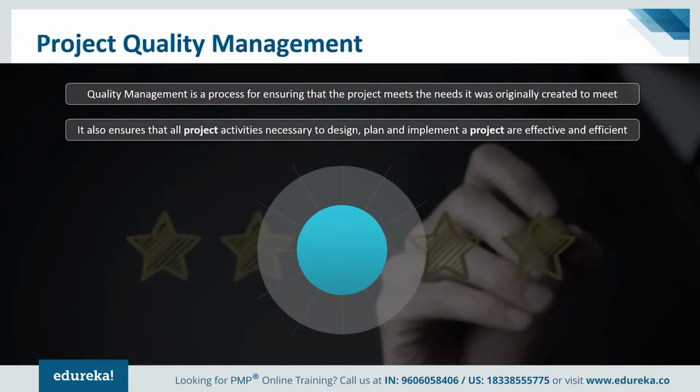There are a few things that we need to definitely make sure we are doing as part of quality. One is, of course, verification. Continuous verification is what is expected from the team and the project manager. For example, a simple verification could be a traceability matrix. We ensure to have a traceability matrix on the project so that we verify the requirements that we have gathered from the customers. Are we incorporating those while designing, coding, testing, deploying, etc.? That simple verification really helps us. And it's not just backward traceability, but also forward traceability that we ensure we are doing. So that's a quick example of verification.